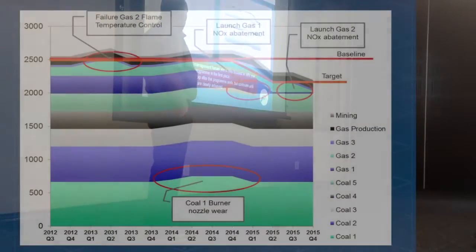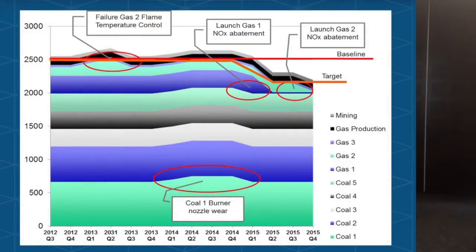So what I'm trying to say here, this graph is the NOx emissions from all the power stations, one of the things in the example. We say we start at this point here, that's the total emissions, and we track it regularly. And the business must report in the steering committees how they're progressing. So suddenly they started saying, oh hell, there is more NOx being emitted. The temperature control on this burner went haywire and they didn't notice it. So better fix it, Mr.